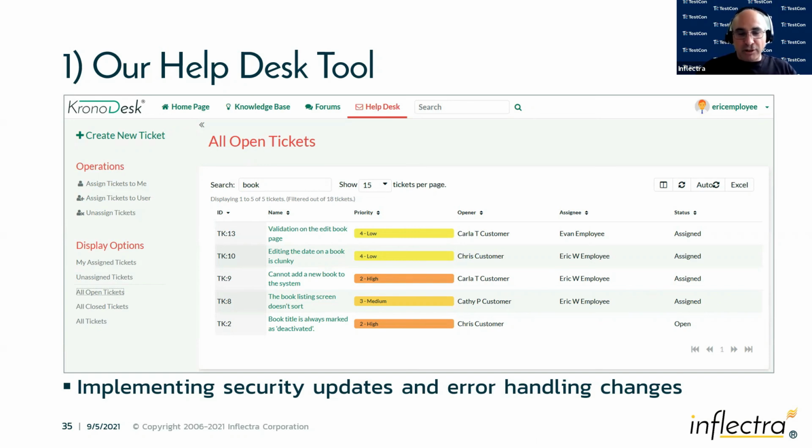We probably, in retrospect, should have released some of the security updates more piecemeal. There were ways we could have done it in a way that would have been less invasive, but we didn't do that. And by the time we realized, we were too far along in the changes. And so we just had to plan extra months. But it was a very frustrating release, a lot of wailing and gnashing to get this one out.